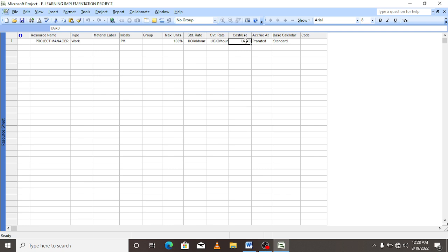It is 10,000. And then here on accrue, they can say use prorated, or use end, or use start. They can specify. Since they have not specified, let's leave it on prorated.